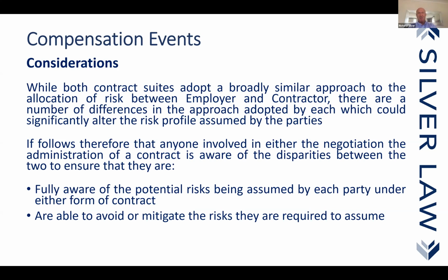So let's give an example. The employer goes off and gets an architect. They get the employer's requirements put together, and included within those employer's requirements is all the steel work and everything else, and also the site layout and the site boundaries. And all of that is wrong. The contract provides that the contractor takes responsibility for all that information. It's now the contractor's problem, hard luck. But that's got nothing to do with misrepresentation.